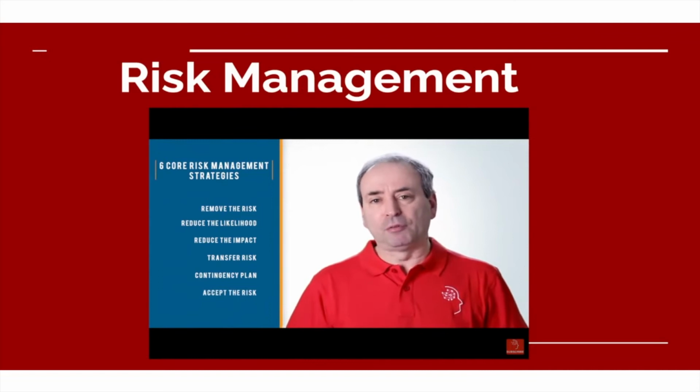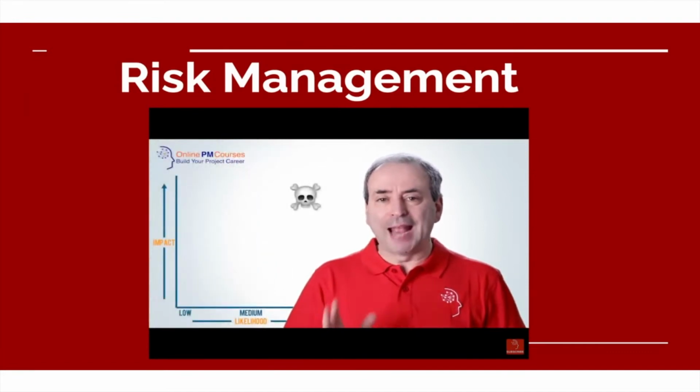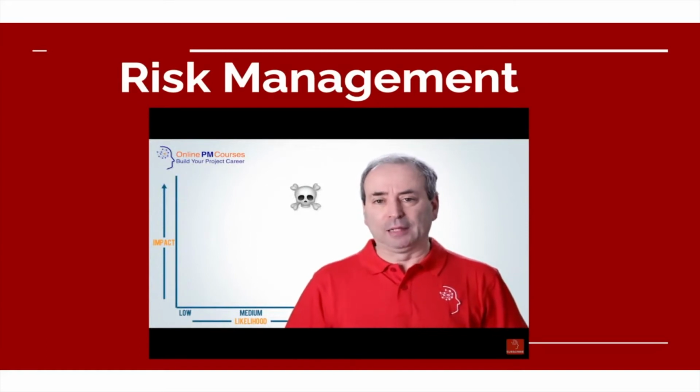If the level of threat is small enough and you consider that none of the other strategies offers a cost-effective solution for reducing the risk, then it's totally appropriate to accept the risk and accept that if it does occur, you'll need to do something about it. But hopefully it will not be a very serious risk, because otherwise you will have implemented one or more strategies. And clearly for the highest likelihood and impact risks to the top right, you'll need a whole basket of strategies to handle them.